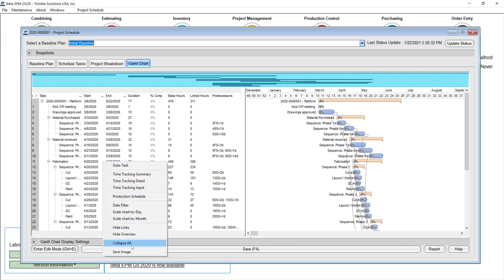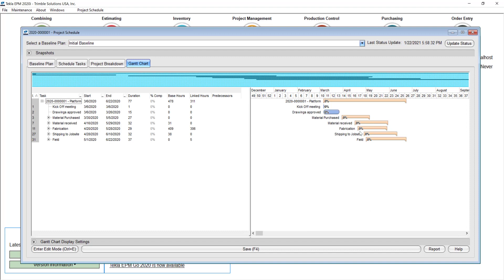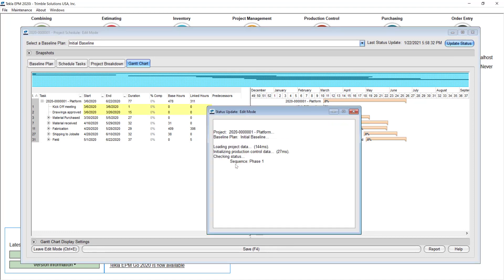Let me collapse this so it's easier to read. Everything is at 0. But as soon as you click update status, it will go and find in the drawing log how many drawings have been approved and calculate the percentage those drawings represent. It will also find the material purchased, received, fabricated, and shipped to the job site. I'll click update status and let it find that information in real time — as soon as people input that they have done something, the system recognizes it immediately. It just takes a couple of seconds.